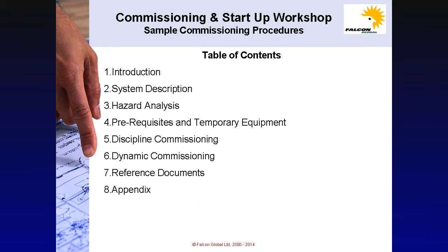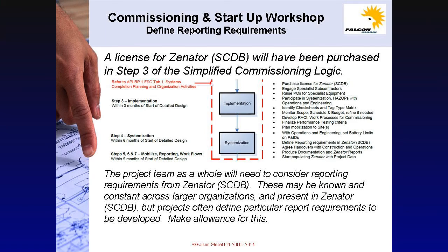A license for Xenator or the SCDB will have been purchased in step 3 of the simplified commissioning logic. The project team as a whole will need to consider reporting requirements from Xenator or the SCDB. These may be known and constant across larger organizations and present in Xenator or the SCDB, but projects often define particular report requirements, and these need time to be developed. Make allowance for this in the project schedule and ensure it is completed before the project team demobilize to site